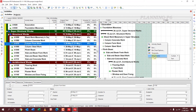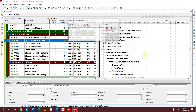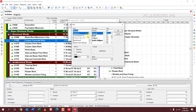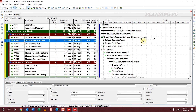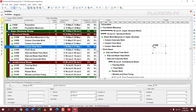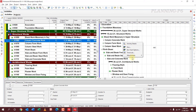You can also close and open the curtain manually by date, which is useful to show project delays for a specific period. You can also delete the curtain, or Hide All / Show All. For Text, you can add text anywhere on the Gantt chart — for example, type 'ABC', click on an activity, and add remarks or notes. This text will also appear in your PDF export.